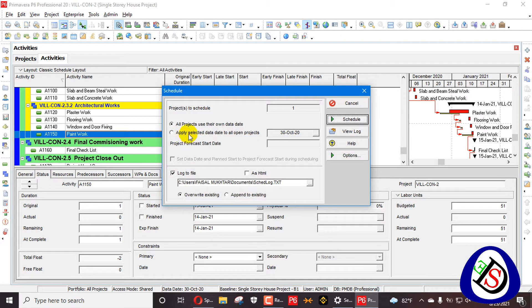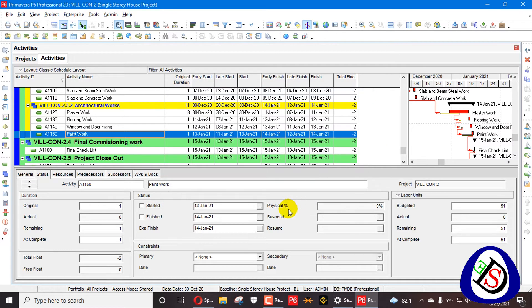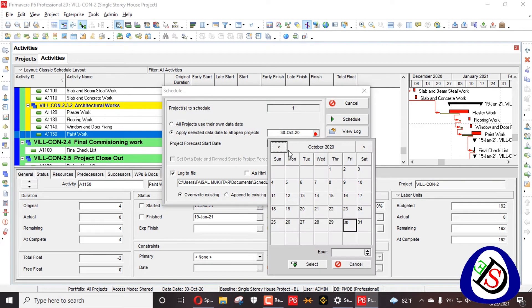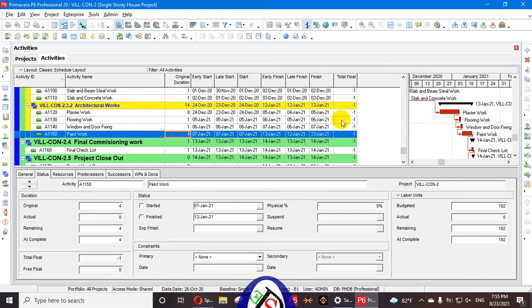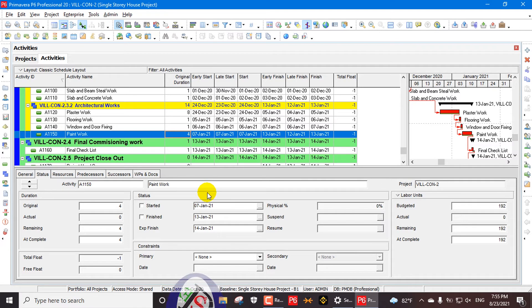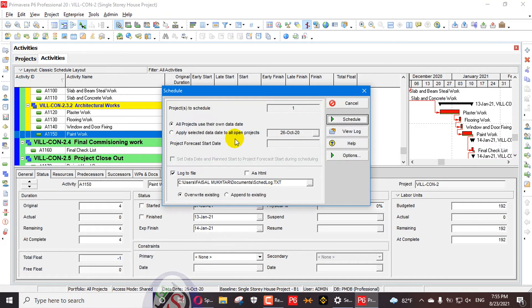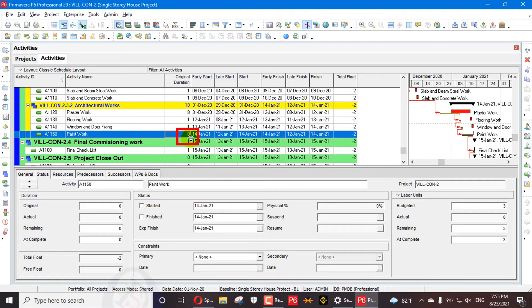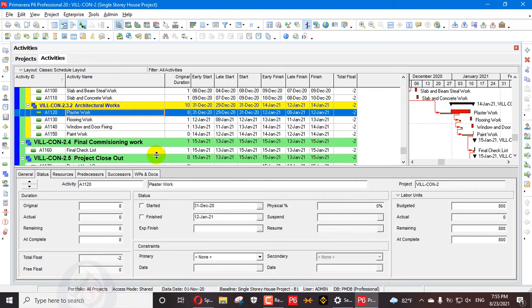Let me remove the expected finish and reset the activity back to 4 days, scheduling back to 26th of October. Now I assign the expected finish of 14th of January again and schedule my project on 1st of November. You will see the duration goes to zero because it fixes my finish date — it fixes my deadline. You can assign one or more expected finishes, but during scheduling the first upcoming event will decrease its duration first, then the next upcoming event.